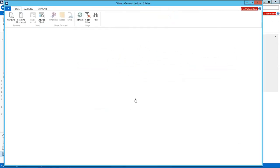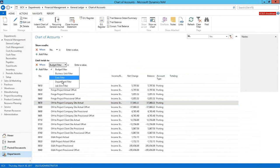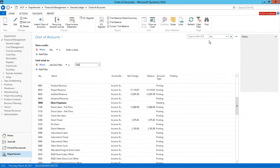If I drill into it, it's going to show me the detail of all the allocations, by job, by department, task, WBS, and the amount of the allocation. You see how that allocation was derived from the detail in the description there. We've got reports that show the variance, so you'll see your provisional, actual, and what the variance is. You also have the ability to set filters. If I set a filter on the job and say I just want to look at transactions for 1002, now I'm seeing all transactions across all accounts for 1002. So it's really easy from an end user perspective to not only run the process, but to easily analyze things.